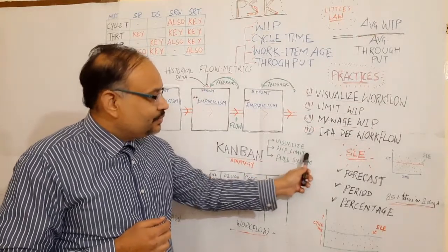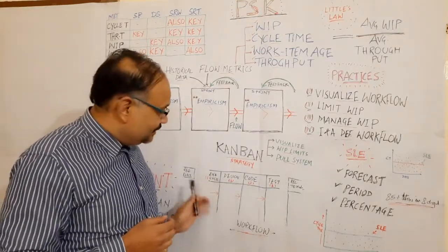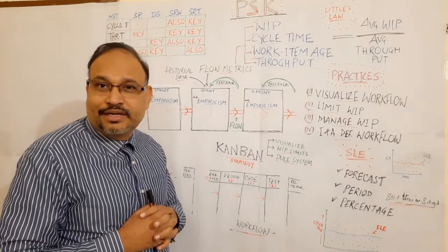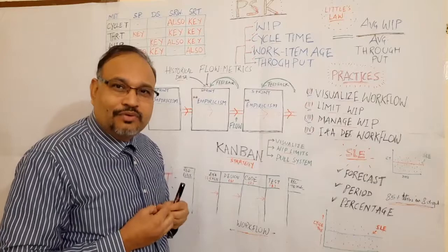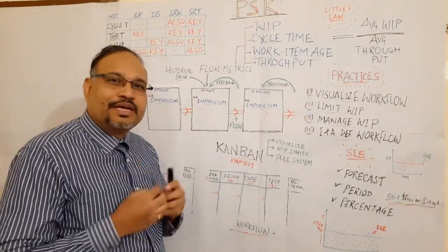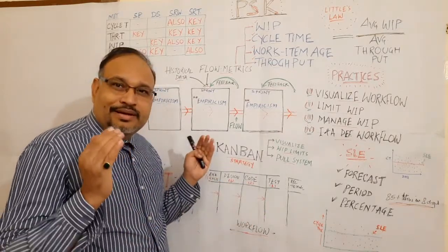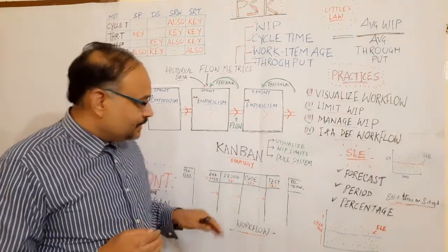Second is placing work in progress limits, right? Any phase within the workflow can have n number of work in progress items. But the whole idea is that if you want to improve the flow, focus on the problems first, then we need to put work in progress limits on each of the phases, or maybe at the sprint level, or maybe at the person level.